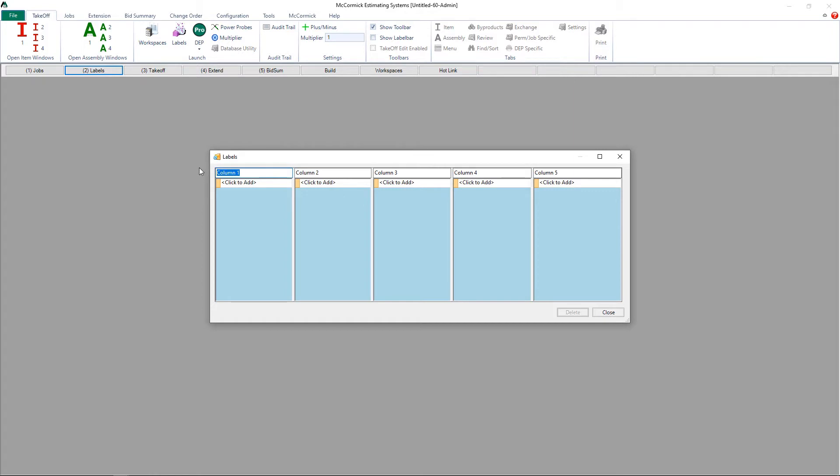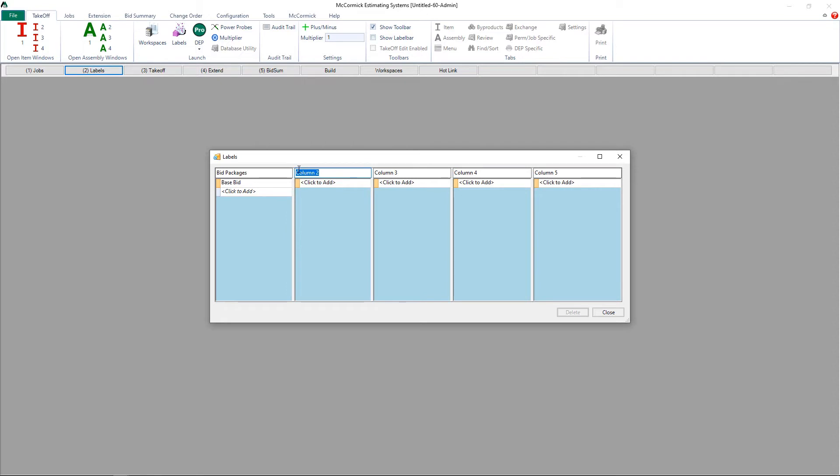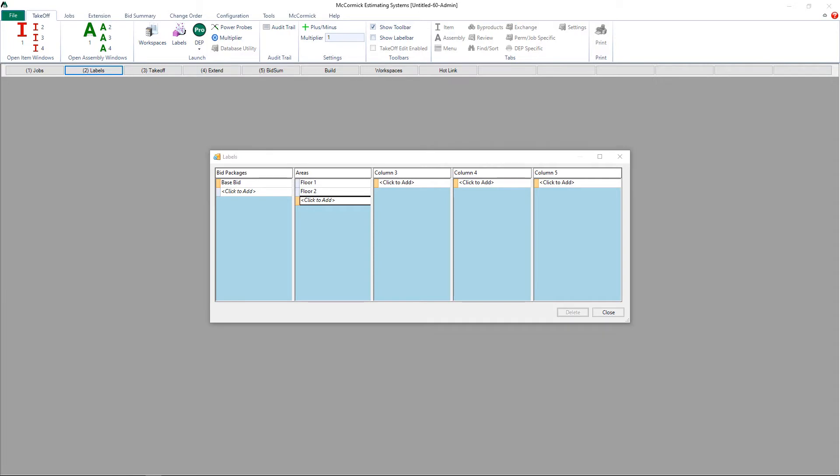Column 1 is designated for your bid packages, and I'm going to start this project out with a base bid. In column 2, I am going to break down this job into different areas. For this example, let's go ahead and break this job out into floor 1 and floor 2.